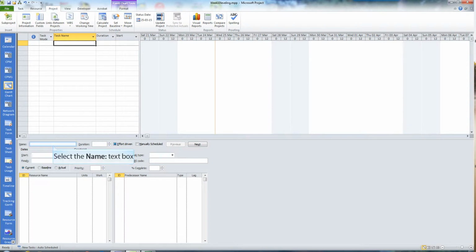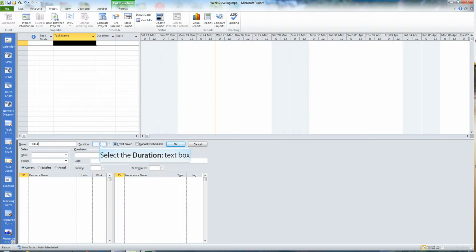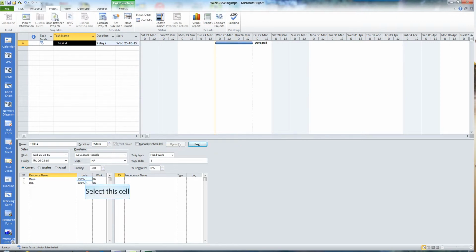So let's just set this up. I'm going to go into my first task and we'll create that. And we'll say task A. It's going to be a duration of 2 days. This one we'd like to work on fixed work. We're going to go in and add in our resources and say OK. Again, we have our 2 days, we have our two resources.